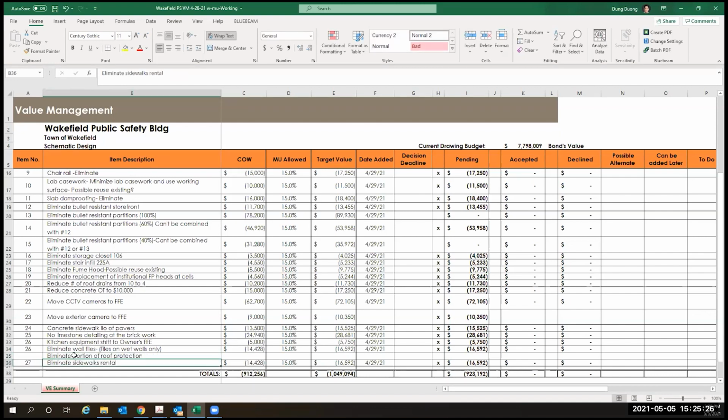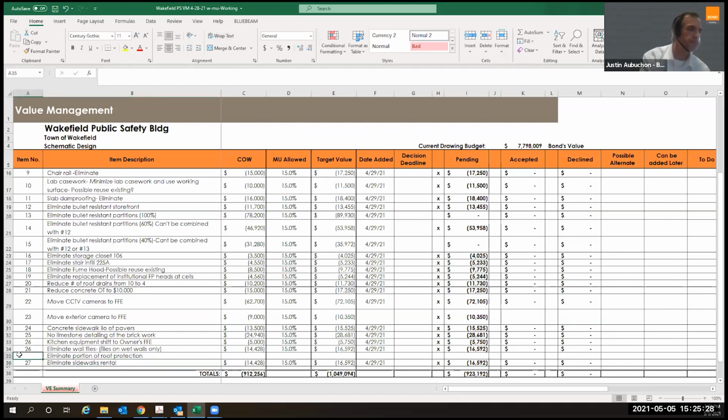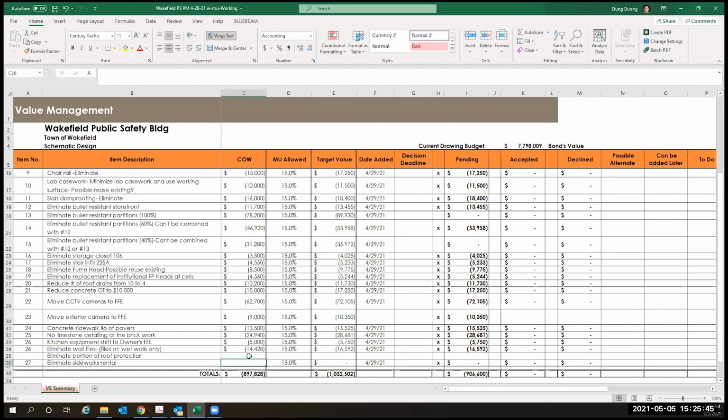Yeah, we could probably account for some of that, because you're gonna need it at the flat roof where the MEP is, right? For sure, at the end. But otherwise, the two long sides have the sloped roofs. Right. So does the roofer own that? No, well, one way or another, it's gonna be in the number. They don't own it. It's not like it's gonna be on the contract documents that the design team puts in. It's gonna be in our requirements for safety.